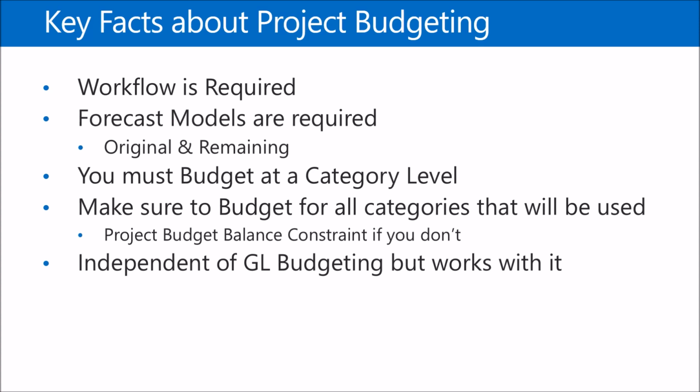Independent of GL budgeting, but works with it. Basically, project budgets are their own entity. They really are. When you're creating a project budget, it has nothing to do with the general ledger budget that's set up in the budgeting module, unless you run a routine that actually transfers it to the general ledger budgeting. So just think, when you're creating a project budget, that it's its own entity, unless.